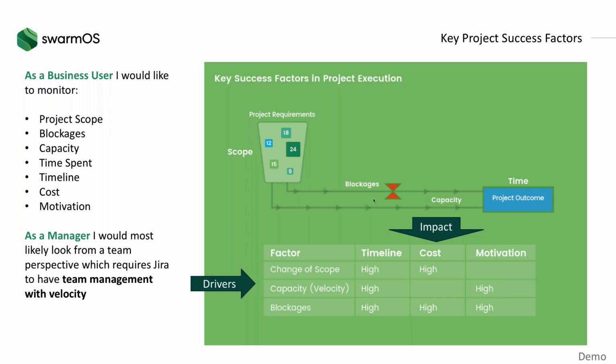Same for cost. If you have 5 teams running for the next 6 sprints, you can determine the cost immediately because you have a pretty good idea what this will cost to run the project. Motivation is an early indicator of how a project actually goes. If you have all the skills in hand you need, if you are removing blockages by management, if you get full management support to work agile or not. So, surveying the customer as well as your teams after every sprint is a key factor to success, because you would get an early indicator.